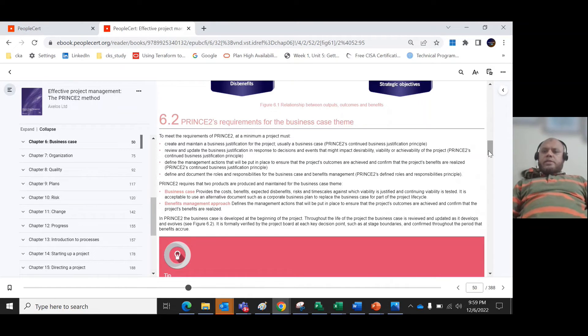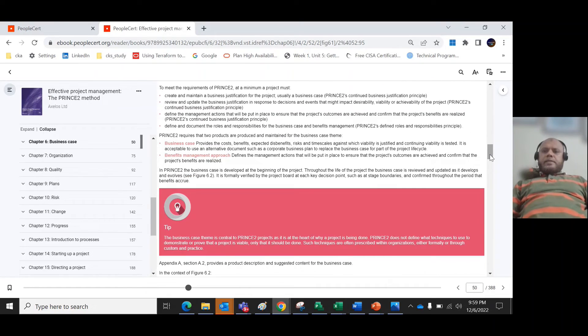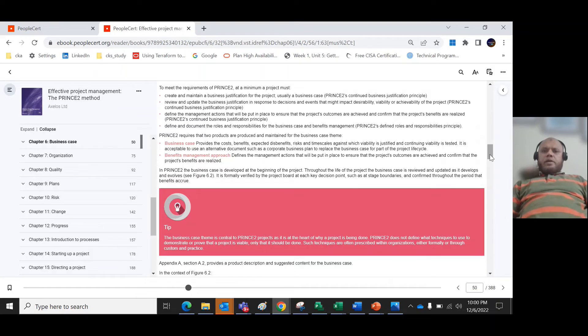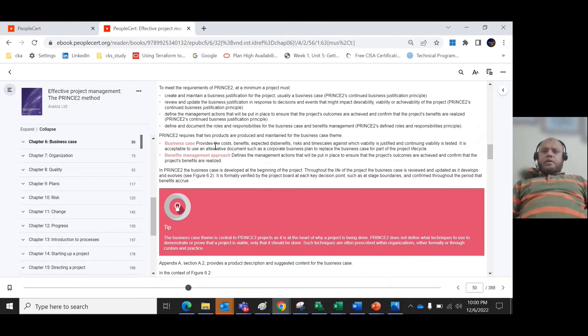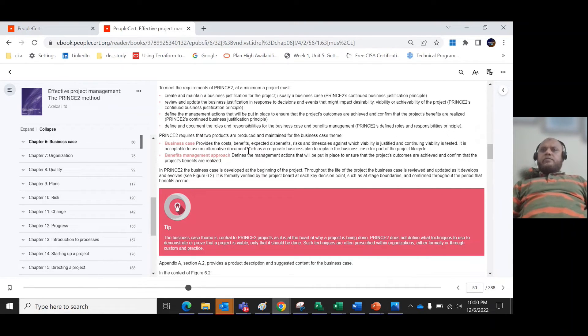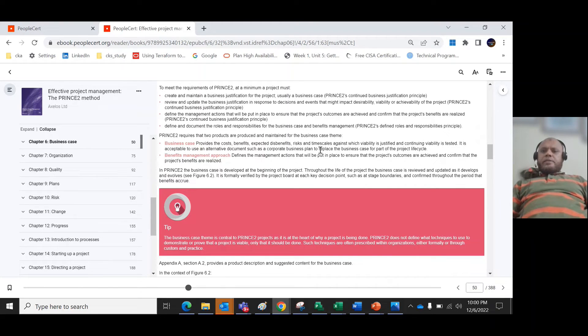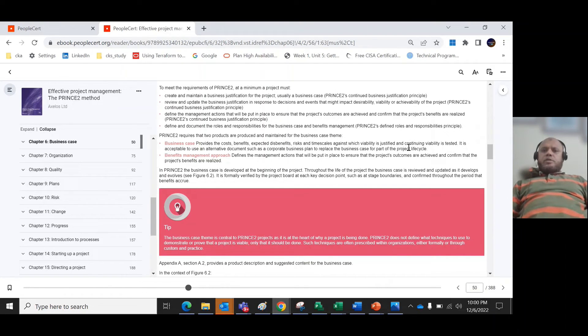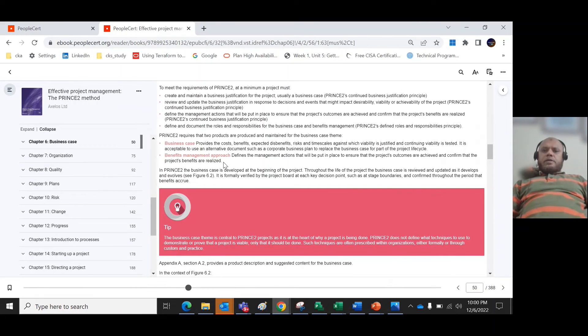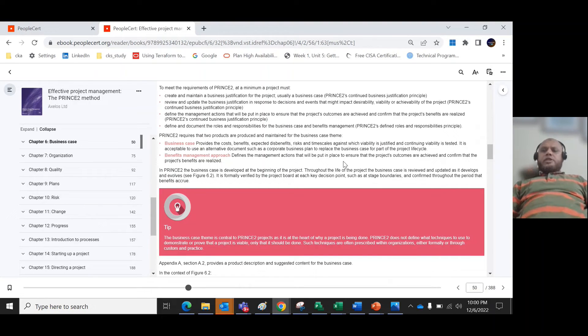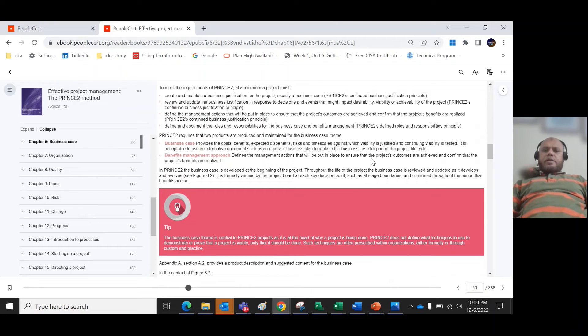PRINCE2 defines and documents the roles and responsibilities for the business case and benefits management. PRINCE2 records that two products are produced and maintained: one is the business case that provides the cost, benefits expected, risks and timescales against which viability is justified and continuing viability is tested. It is acceptable to use alternate documents such as corporate business plan. Another important part is the benefit management approach that defines the management actions that will be put in place to ensure that the project's outcomes are achieved and confirm that the project benefits are realized.